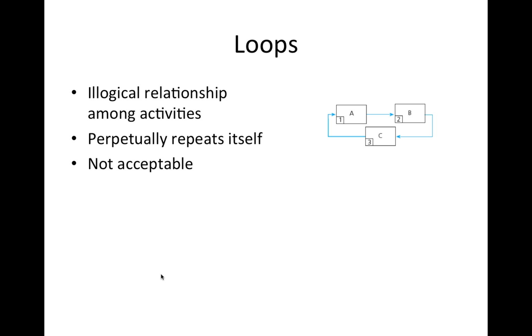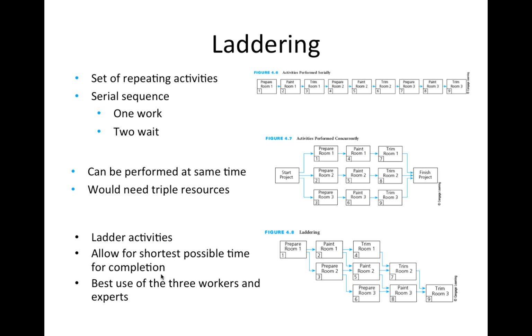Activities should not be longer in estimated duration than the time intervals at which actual project progression will be reviewed and compared to planned progress. It is not unusual to progressively elaborate the network diagram as the project progresses and more information is known or becomes clearer. We'll be expanding our network diagram as we get into this potential project. This figure here shows a network diagram for the consumer market study project in the textbook. This is including the person responsible for each activity.